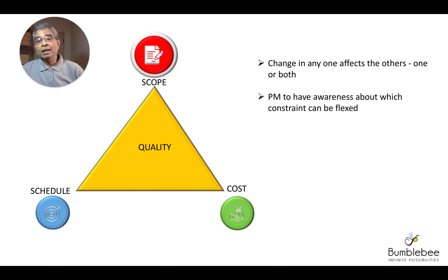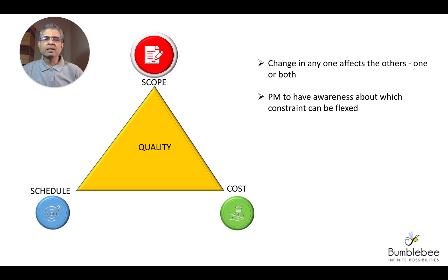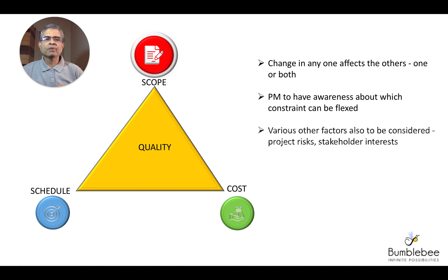In the first case, the budget may be flexible but the schedule is fixed, so it may be possible to put more people and get a slightly higher budget allocation, but the time is more important. In the second case, the cost is fixed, so the customer may be willing to take some hit on the scope or the schedule, but the cost is fixed. Keep in mind these aspects while deciding how to manage within the three constraining aspects of the PM triangle.